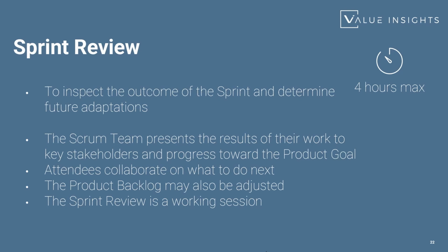A sprint review is time boxed for 4 hours maximum for a 1 month sprint. So this means that in case your sprint is only 2 weeks, you use a pro rata temporis, and you will say that, well, 4 hours for sprint review for a month of sprint, then if we have a 2-week sprint, it's just 2 hours maximum.